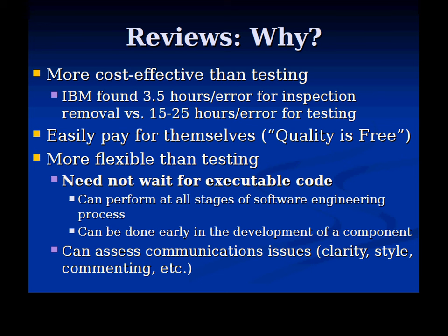They're more flexible than testing. You can perform peer reviews early. You don't have to wait for executable code. You can perform it on requirements documents, on design documents. You can do it on the system requirement specification. You can do it on communications with the user. You can do peer reviews on elements of the system that are defined early, like contracts for different areas of the system.